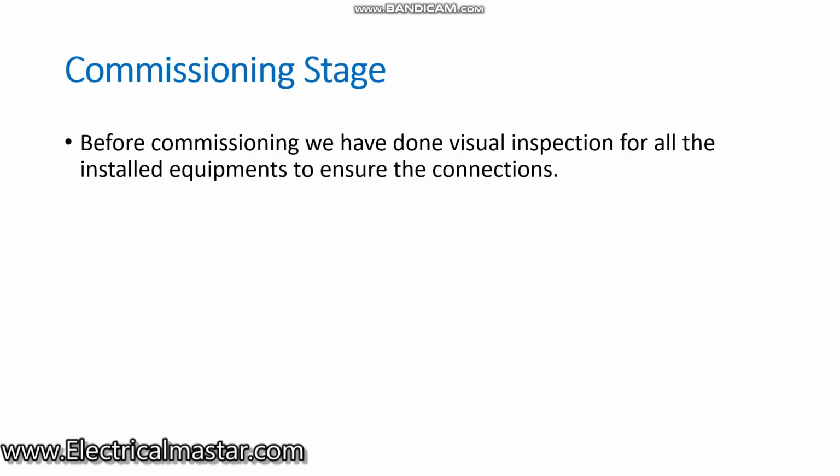Next is the commissioning stage. The commissioning stage is very important, guys, because you will finish the designing and you will finish the installation. Now you are going to power up your office. That is the commissioning stage. Before we do the commissioning, you have to do a visual inspection of your job, whatever you have done in that office or in your project.